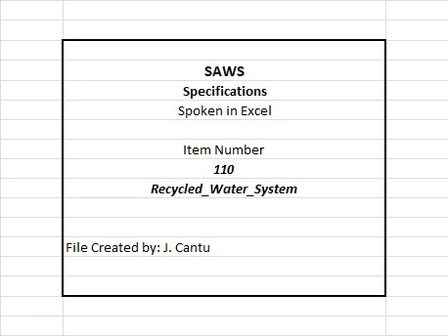110.3 Submittals. All submittals shall be in accordance with the most recent version of SAWS General Conditions Requirements. Contractor shall submit manufacturer's product data, instructions, recommendations, shop drawings, and certifications. All submittals shall be in accordance with the engineer's requirements and shall be approved prior to delivery.